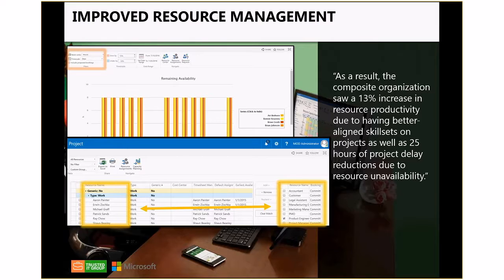So Microsoft PPM allows you to build a schedule with generic resources built into the project plan. So let's say that you're doing an infrastructure deployment project, for example. And every single time that you do this project, it's the same tasks, it's the same milestones, you need the same skill set on each task. Maybe for the first phase, you're going to need a bunch of engineers. And then for the second phase, you're going to need a bunch of analysts, for example.